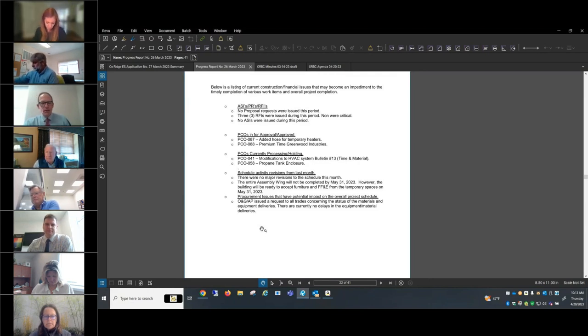Yeah, substantial completion is defined as the point of beneficial use, where it could be used for its intended purpose, but we know that there are going to be some finishes and spaces like the gymnasium that likely will still be finishing up some detail work. But as far as having a building that's ready, we can go through occupancy inspections. I know in town, right, George, they want to see furniture before they actually issue a TCO or a CO, right? They won't grant anything until they actually see the furniture placed, correct?